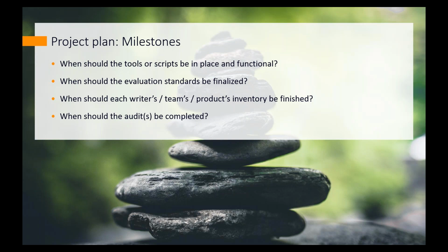So for example, you may be able to inventory one self-contained group of content, start the conversion on that while continuing to inventory another part of that content. So you need to decide, when should everything be done, and once this step is done, can you move on to the part of your actual project, or do you have to finish the whole inventory at once?